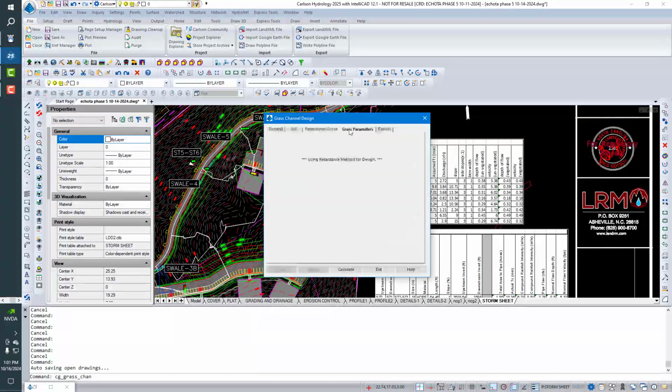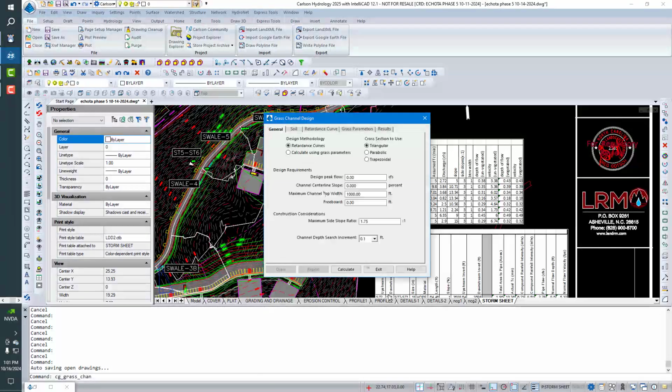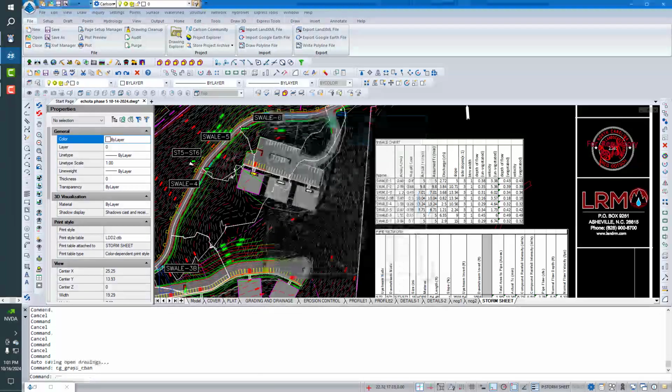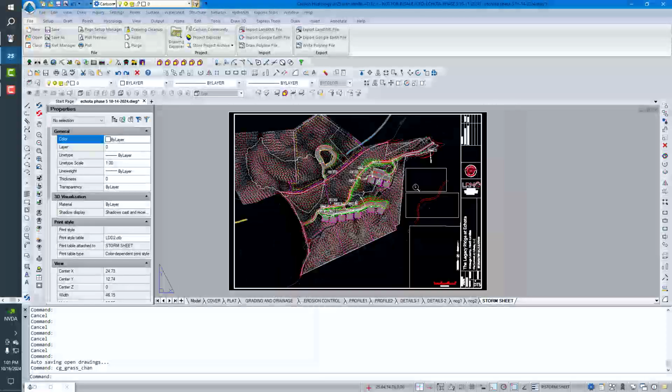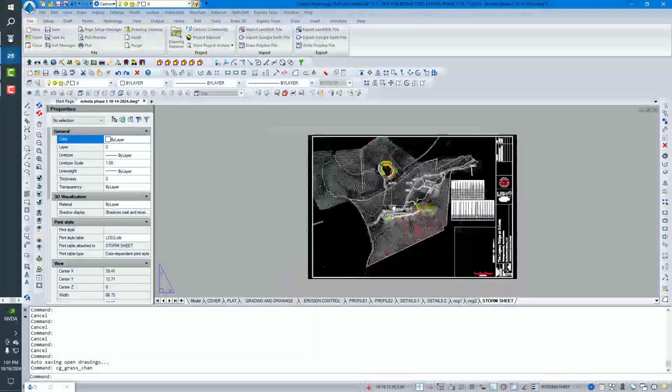but in my experience with making submissions, if you send something in that looks different than what everybody else is sending in, it'll take longer to get it reviewed. And sort of the magic bullet on getting an approved swale on, say, a post-construction low density site is to do the calculations of the swale with the North American Green software. Otherwise, they'll just beat you to death. So that's the plan set. That's kind of what most people have set up.